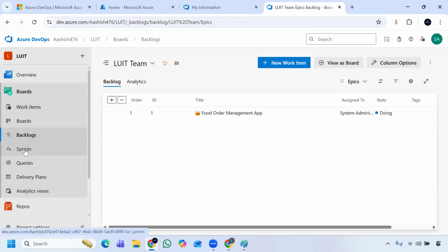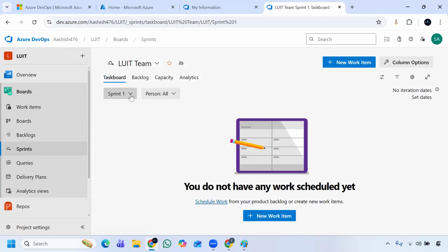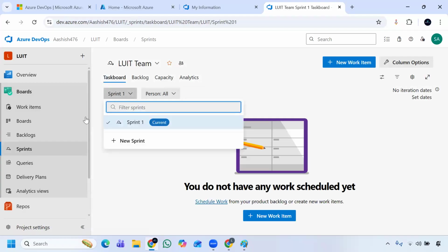Okay, now if you see sprint, what do you mean by sprint? Sprint means you are having some work, so they should define by when you will complete it. In general, how it works in any software application, if they use Azure DevOps or Jira or some other tool, they will have sprints. Some people will have a 15 days sprint, 15 days means 2 weeks. Some people have a four weeks sprint, that is 1 month.